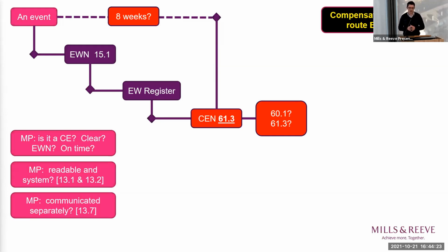Other things that Alex has touched upon, that when you are notifying a compensation event as a contractor, all of the stuff in clause 13 that Alex referred to, make sure it's in writing, make sure it's a separate notice. And there's lots of software out there, CMAR, etc., which should make that a little bit easier to ensure that you comply with the quirky requirements set out within clause 13.